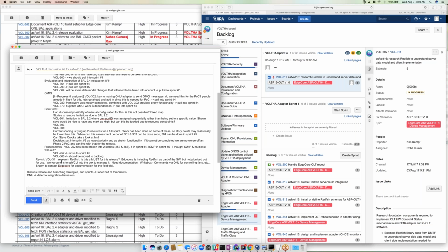I believe this is where the CalSoft resources had initially been focusing their time, but Shad, feel free to reassign them to some critical path items. Shad, are you still on? Yeah, I'm here. Would it be okay if we don't worry about device management like fan speed right now? I agree. Let's get the adapter working, and then maybe you can assign those CalSoft people to some of the Sprint 5 related stuff.